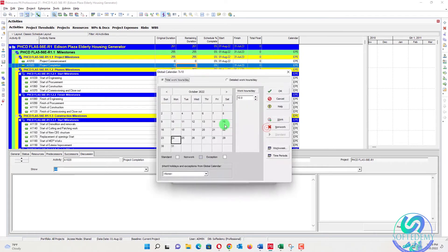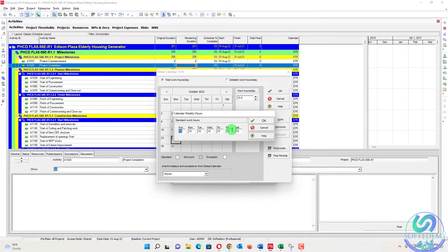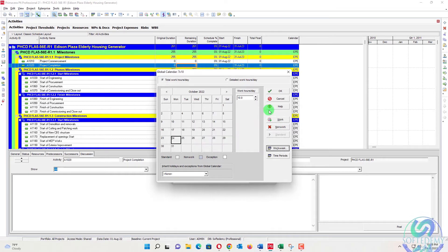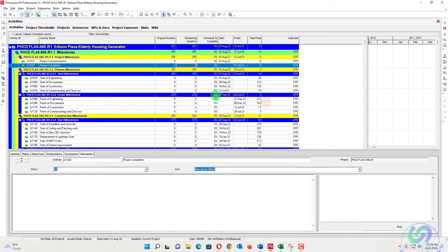Under global calendars, I have already created a calendar called '7 into 10'. We modify the work week so that all seven days of the week are set to 10 hours of work per day — seven-day work throughout the week. Press OK, and this calendar is ready to assign to the project.